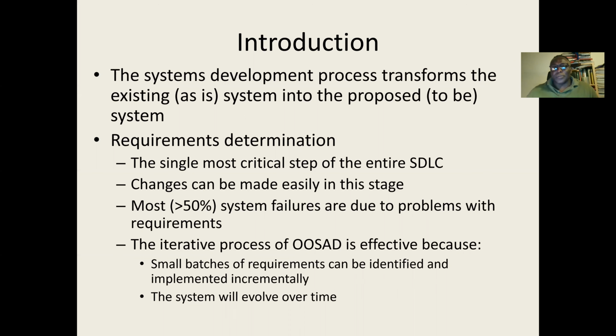So if we are able to detect an error or a mistake in this phase, it's easier to change because we haven't moved forward yet. But imagine if we cannot detect any error and we reach the implementation phase. Already we have spent time and also money on the project. So changing it will require, again, those two items, time and money. The earlier stage, which is the requirement analysis phase, is the best stage to correct any error. Very easy to correct the errors.